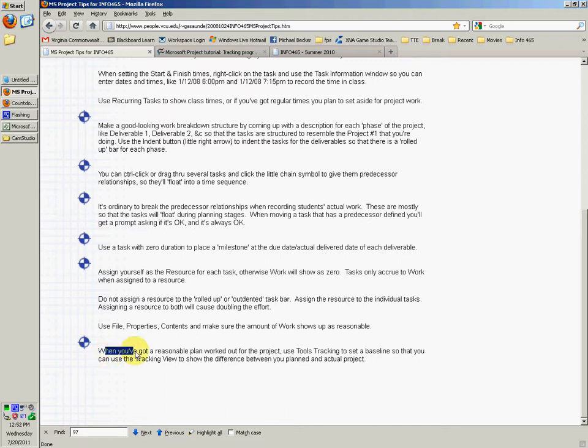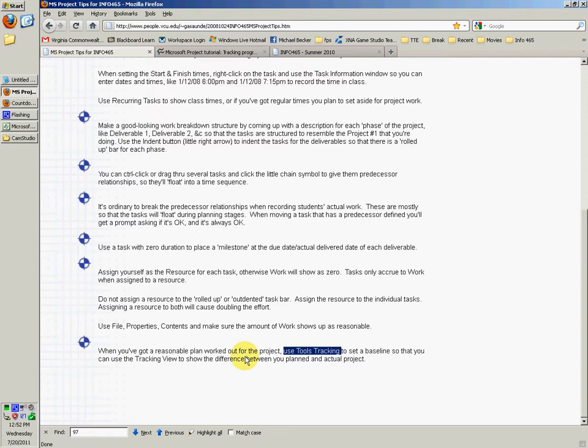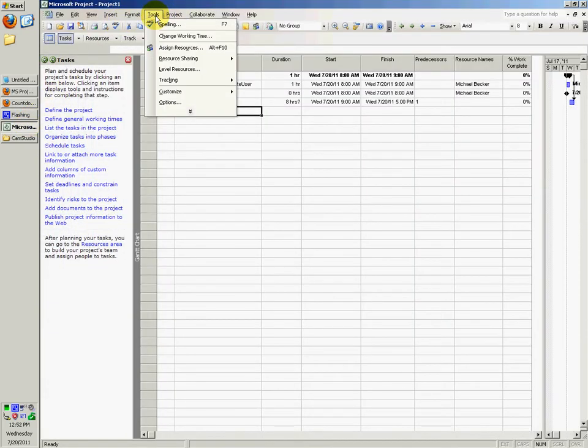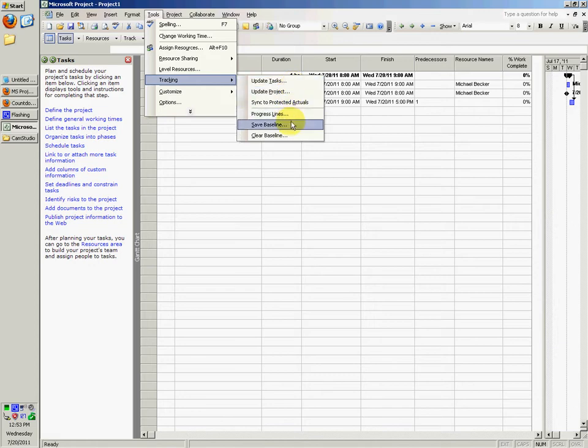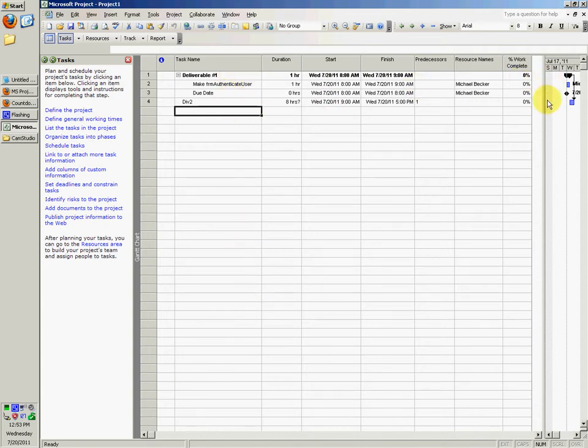So when you've got a reasonable plan worked out for the project, you can use Tools, Tracking, to set a baseline so that you can use the Tracking view to show the difference between the planned and the actual project. You would go to Tools, Tracking, Save Baseline, once you have all of this completed, once you make all of your tasks and all that.